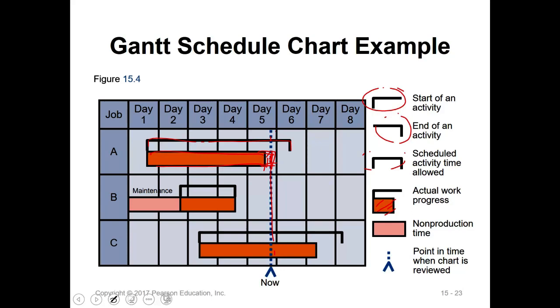activity A is a little bit behind the schedule. And I'm saying it's very close. Okay, for activity B, this is showing already finished. So starting and end point, that's the schedule. This is the real activity. It's done already. But for C, it is saying, okay, here we are right over here, but the real activity is already moved to about 2 days later. So that means it is before schedule.